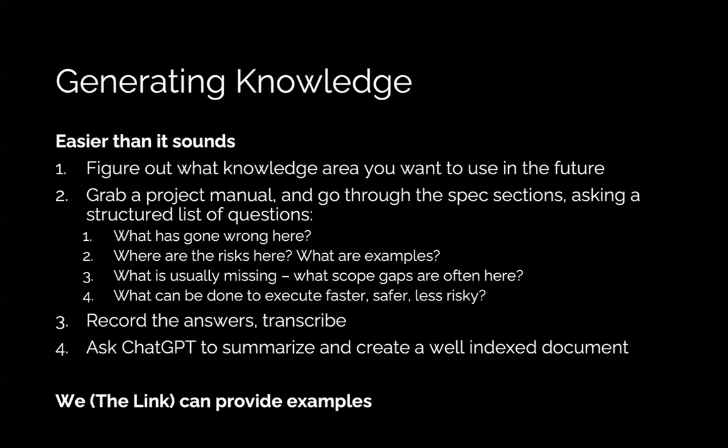But the point is, and I think for this industry, this is a really important idea and important practice that I hope we begin to do more of, where we're allowing people to share their knowledge. And again, this is pretty low level stuff. This isn't really senior level judgment. This is more like, hey, here are some things you might look out for. The kind of lessons learned, but here you're indexing it against, in this case, I would suggest indexing it against MasterFormat, because then you can find other places where it'll be applicable.